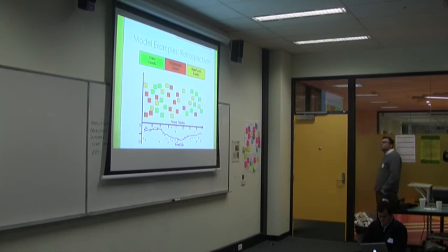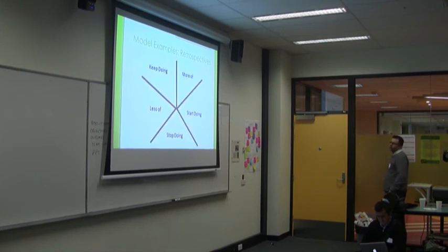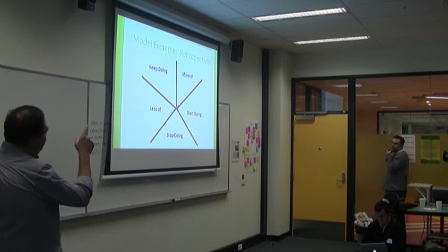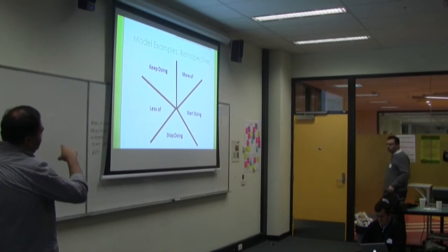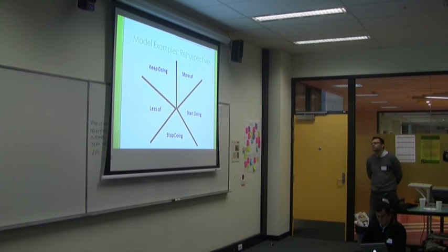Just different events over your timeline, and the little happy and sad faces. We talked about that kind of motivation barometer. You get people to plot that, and you can do a trend line. Impact and frequency, this is if you've got some really big problems you want to address and highlight. And then this has become a very popular retro model, the starfish. Sometimes you don't have to have all 5 of these. You can have start doing, stop doing, and keep doing instead of the 5.